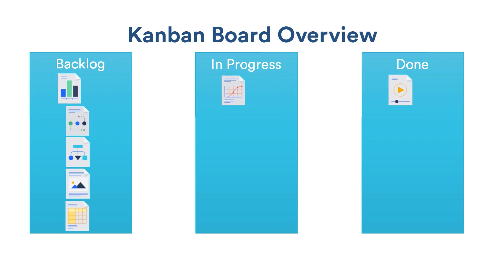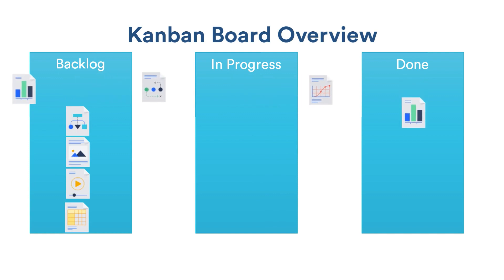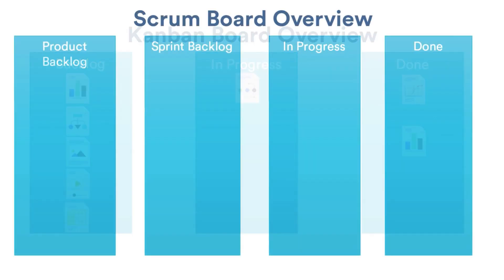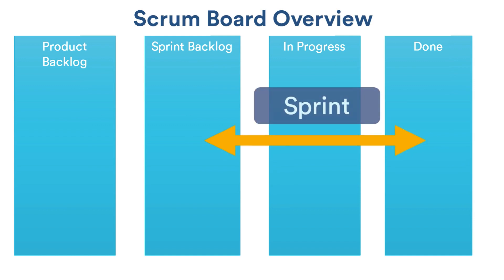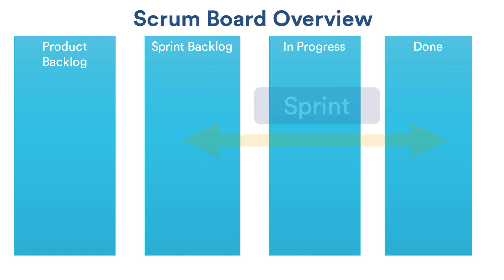For the following tutorials, we'll focus less on Kanban boards and more on scrum boards. Unlike Kanban boards, scrum boards help teams whose focus is on planning, committing, and delivering bodies of work over a fixed length period of time called a sprint. The team decides how long they want their sprints to be. Typically, sprints last about two to four weeks. Managing the scrum board before, during, and after a sprint is a team effort.